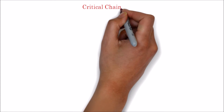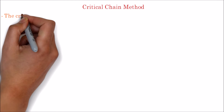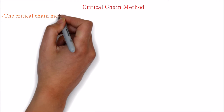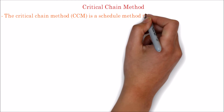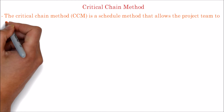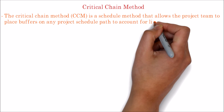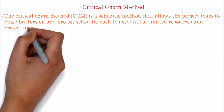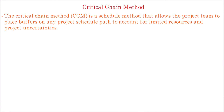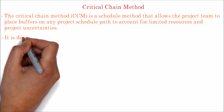Let's look into the critical chain method in this video, which is another type of network diagram method. The critical chain method is a schedule method that allows the project team to place buffers on any project schedule path to account for limited resources and project uncertainties.